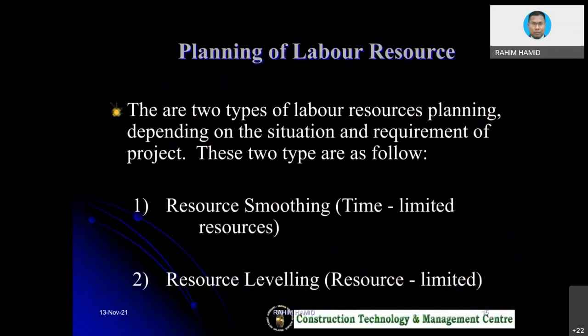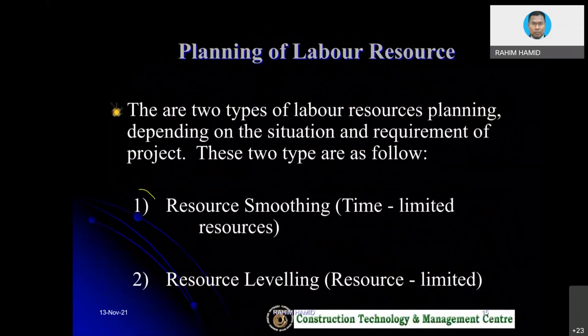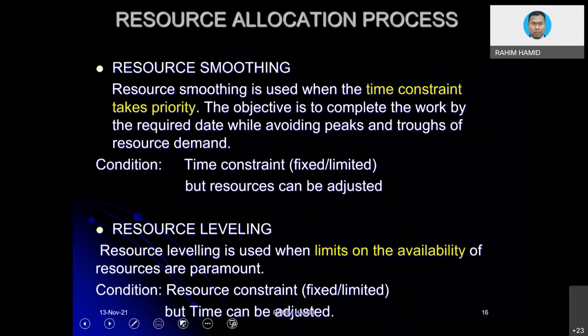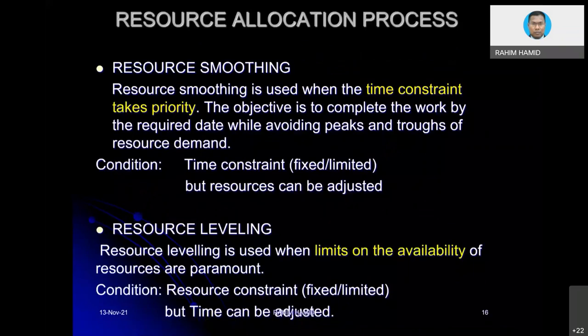All right, so now resource smoothing and resource leveling. Resource smoothing is the situation when, okay, maybe this one is much better. Resource smoothing is used when the time constraint takes priority. The objective is to complete the work by the required time while avoiding peak and trough.